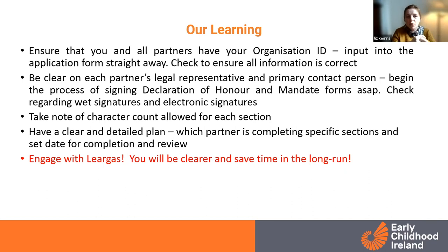And check to see what requires wet signatures, which is when you get your pen out and you sign something, and when an electronic signature is okay on forms, because it might take you a while to get a wet signature, particularly if you're working from home. Very small thing, but it could take days. Put days on your application. Take note of the character count. You're required to be fairly pithy, so every word counts. And again, we did it in Word first, and then transferred it to the application form.